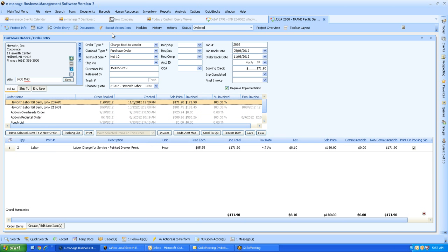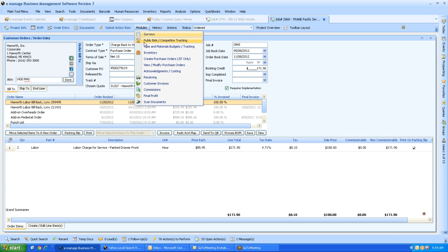So what he's showing you guys is that one project, one job can have multiple orders in it. Each one gets billed separately. Okay, so you can make progress payments. Let's just go here to customer invoices. When you're making invoices, you're making them per order.